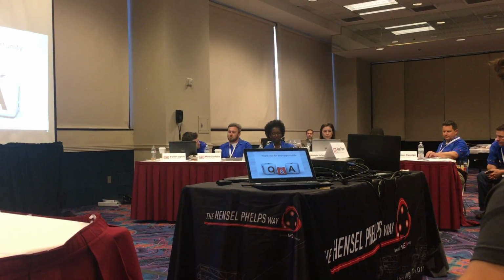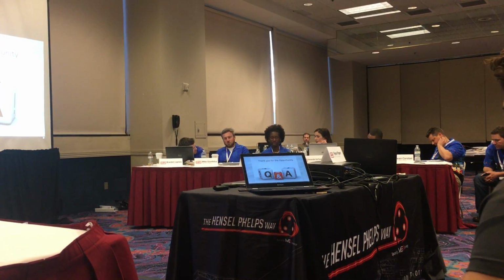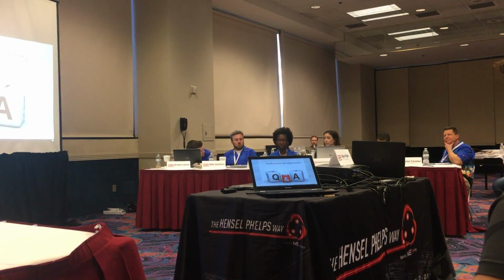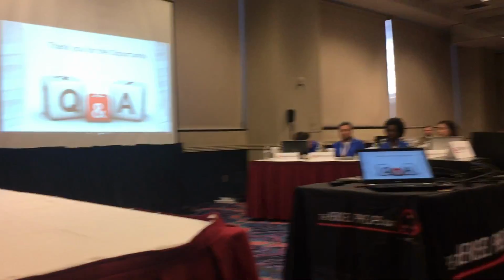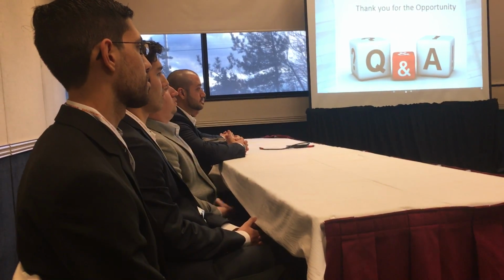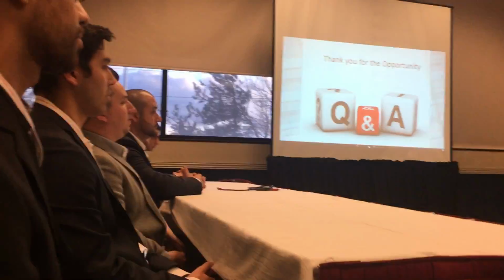So it mentions in here that hanging drywall in these restrooms should take approximately 5 days. So I just wanted to clarify, does that also include the cost for the demolition of the existing non-rated walls, as well as the time for the demolition, or is that strictly just hanging? That's included, the demolition and the cost of the hanging of the drywall.